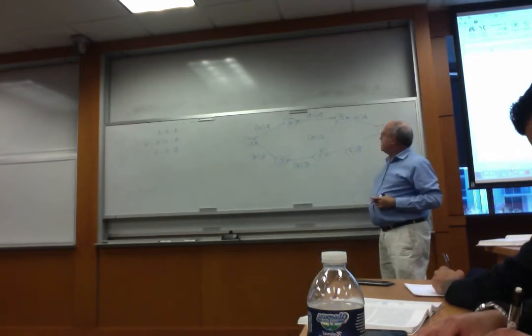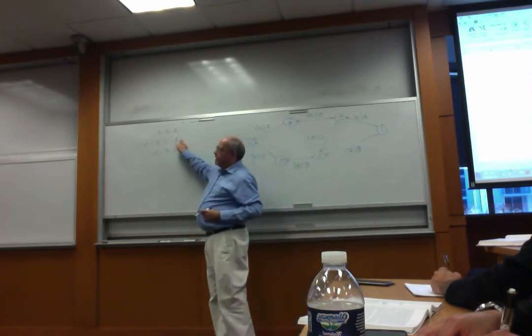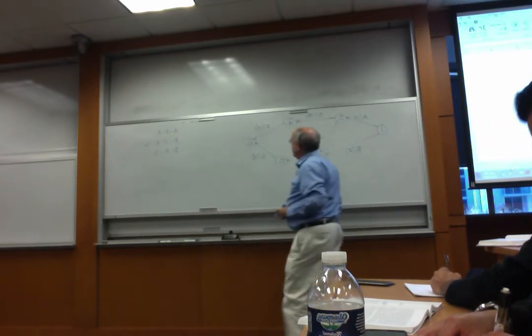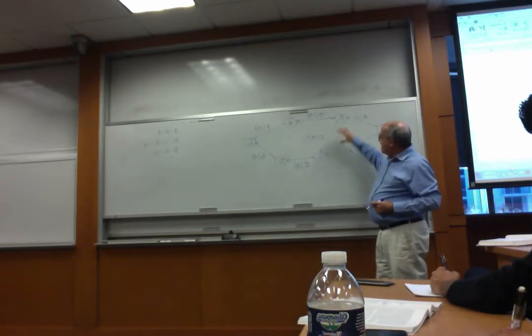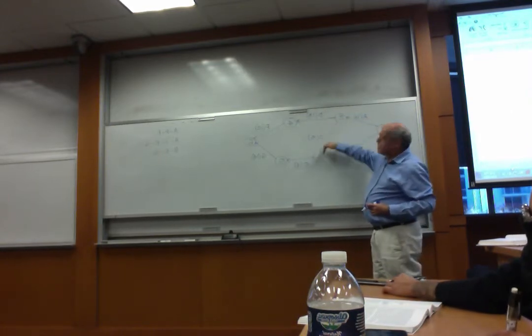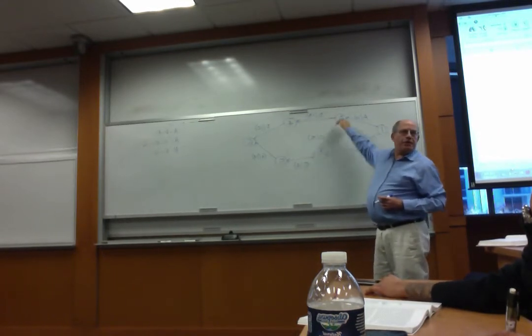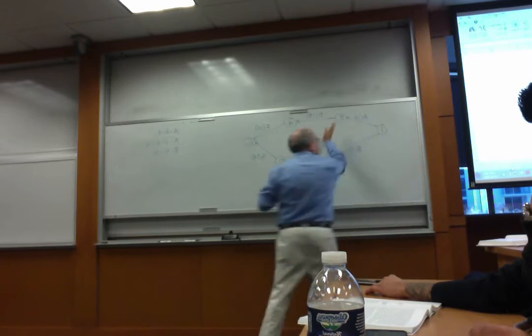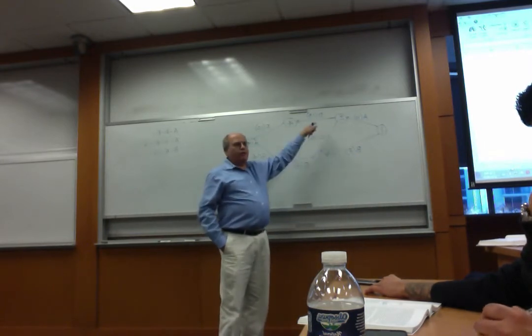Which one? A, C, E, G. I listed this one here. What about B, C? Let me see again, everybody. B, C, remember, those are one-way. We cannot go up on C. Remember, there's an arrow pointing down. So B, C is not a valid one, because you treat it as a one-way street, so we cannot go back there.